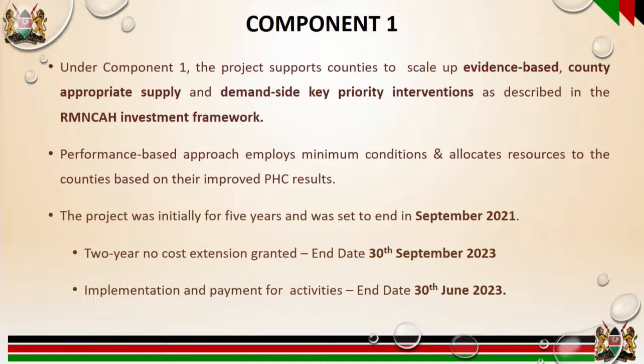So we requested for an extension to cater for the first year where funds were not disbursed, and also to cater for the delays due to the COVID-19 pandemic. So we were given a 2-year no-cost extension till September next year. We are therefore working towards having the counties complete implementation by 30th of June 2023.